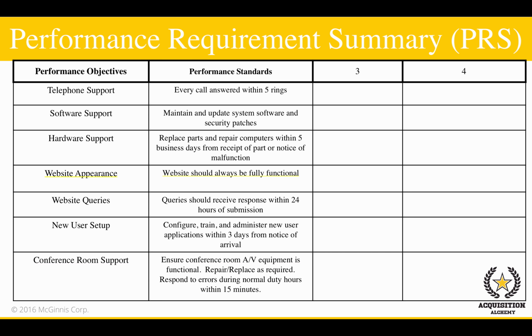The Website Appearance Performance Standard says, website should always be fully functional. Always is measurable. Maybe not attainable, but measurable. And for answering website queries, we have, query should receive response within 24 hours of submission. Within 24 hours is measurable.